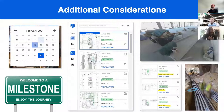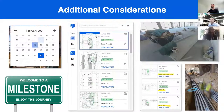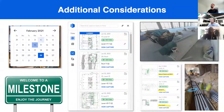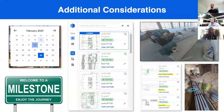Talking about added considerations for walks: during onboarding, once a week is a good time period. You're really looking at the duration of the project and what you're trying to capture. A lot of people like to just stay up to speed on the project rather than capturing for a formal turnover — so once a week is a good time frame. Beyond that, think about milestones: existing conditions, foundation or underground utilities, structural reinforcing, the pre-rough-in when studs go up, and the as-built stage.